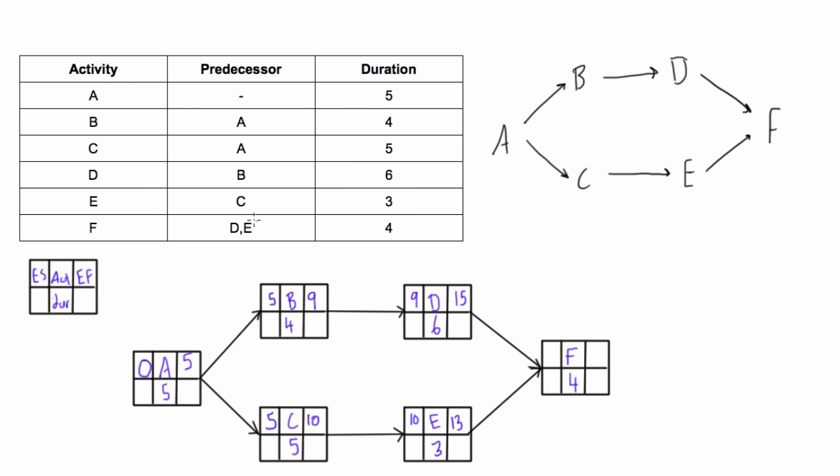So if we just started F at 13, that would violate the fact that it has to start after D is done. Because it has to start once both of them are done, you have to take the larger value. Otherwise, you'd be violating one of the predecessor relationships.